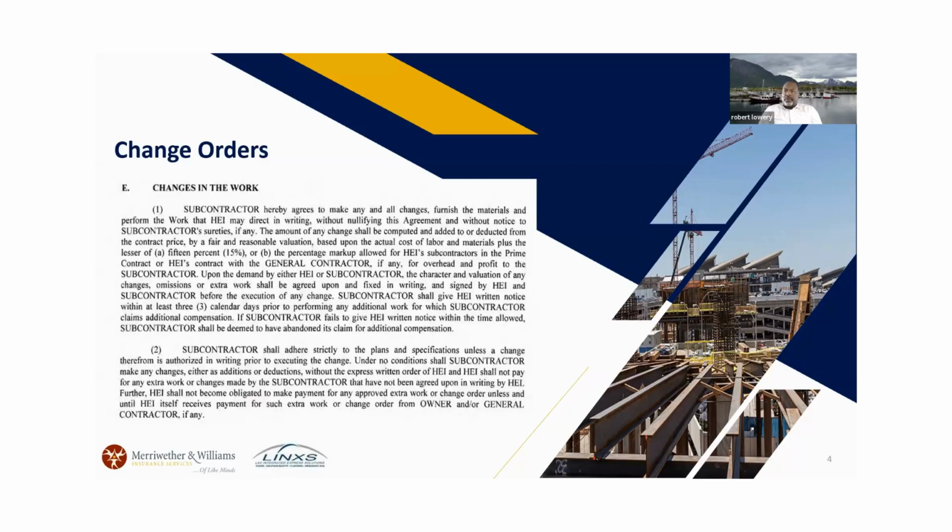So they also go through what is supposed to be fixed in writing. Even though they say, hey, I want you to make this change, I want you to make this change, you want to make sure that you get it in writing, just like it says within the contract. Because as you know, as a trade on a bigger project, the superintendent is like, hey, I want you to do this, I want you to do that.